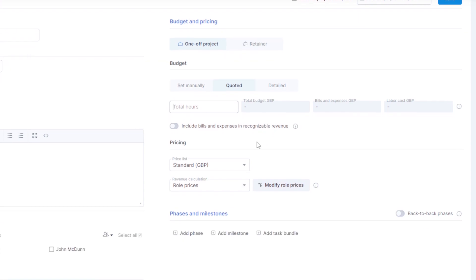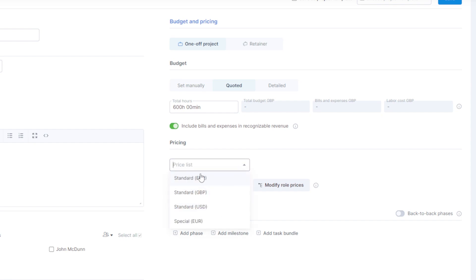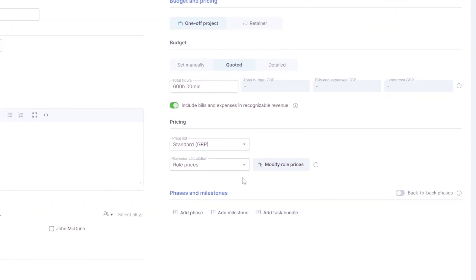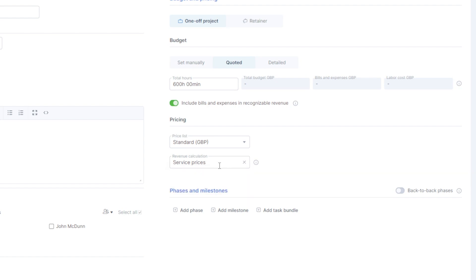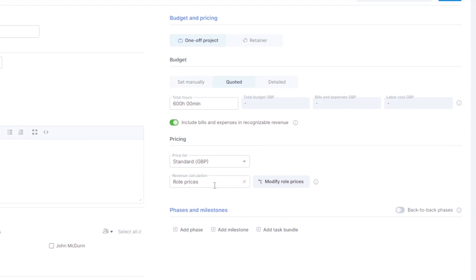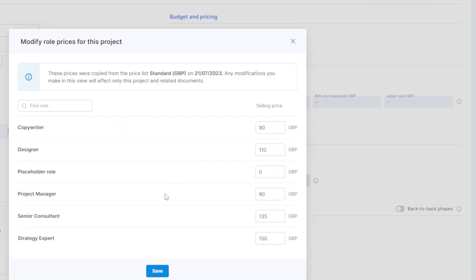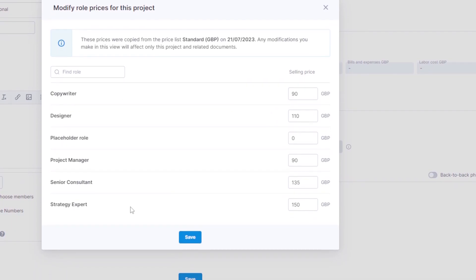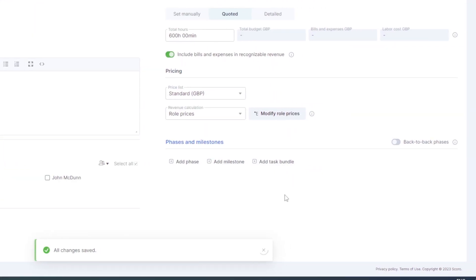Set a quoted budget — for example, around 600 hours worth of work. You can choose to include bills and expenses, select the standard pricing currency such as GBP, and decide how to calculate revenue: either service prices for the whole project, or role prices where you define individual role costs. Once configured, go ahead and save the project.